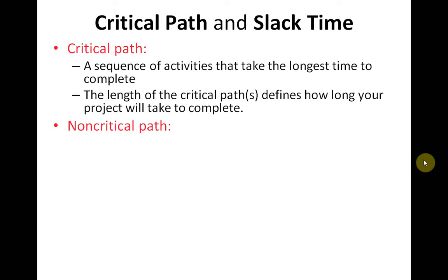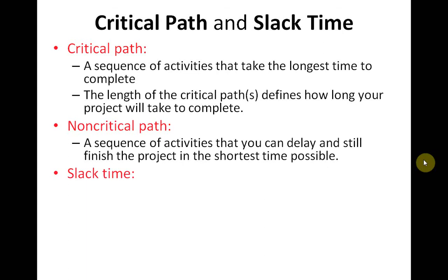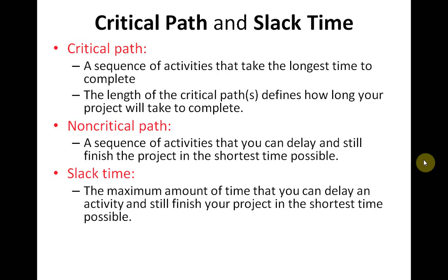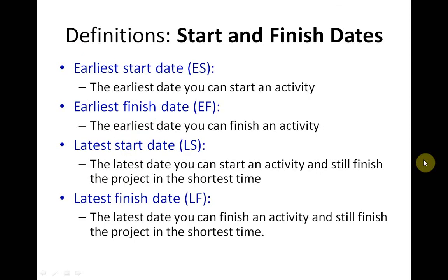shortest time possible. And the slack time is the maximum amount of time that you can delay an activity and still finish the project in the shortest time possible. Now let's see some definitions. The start and finish dates.